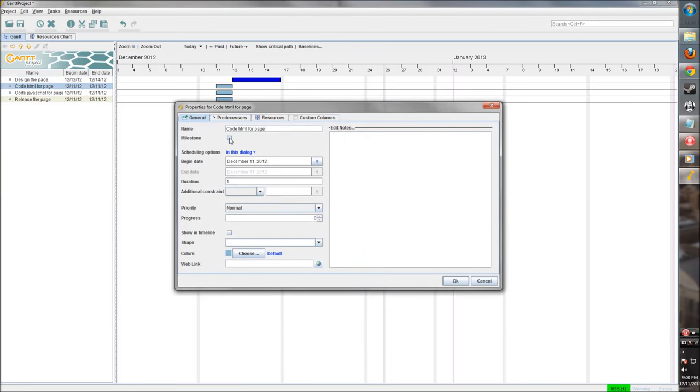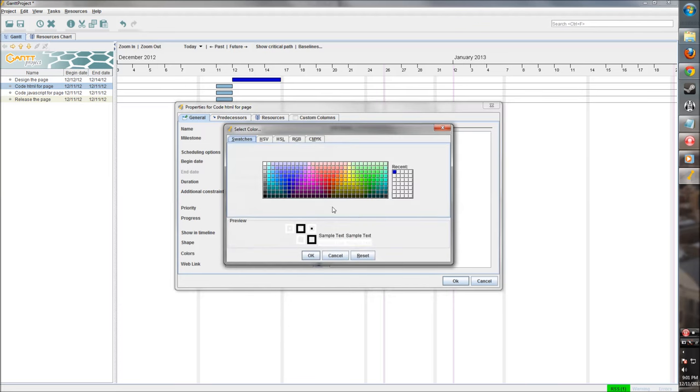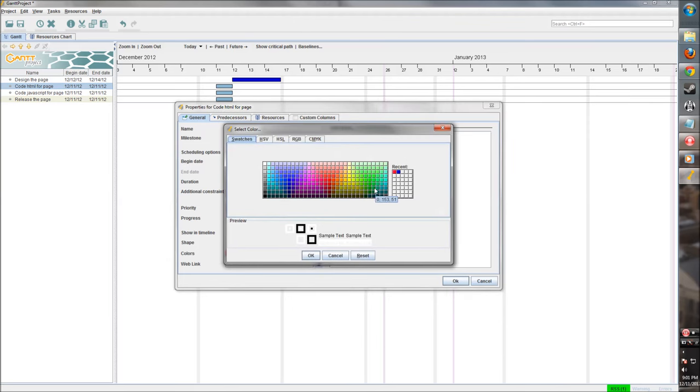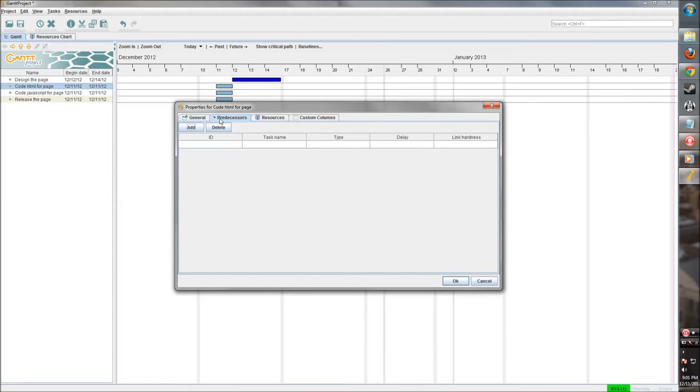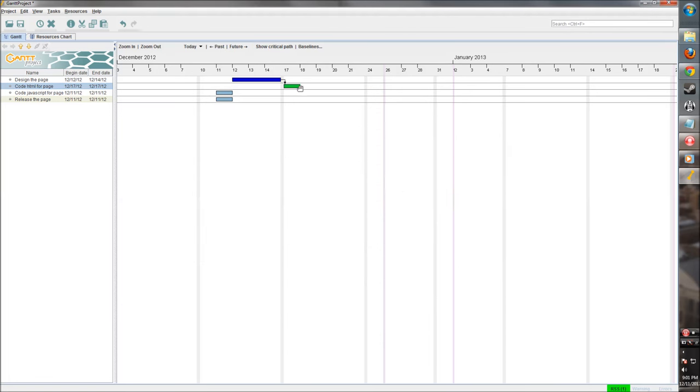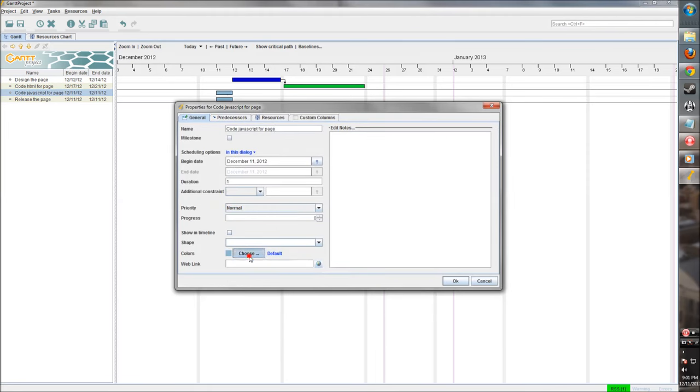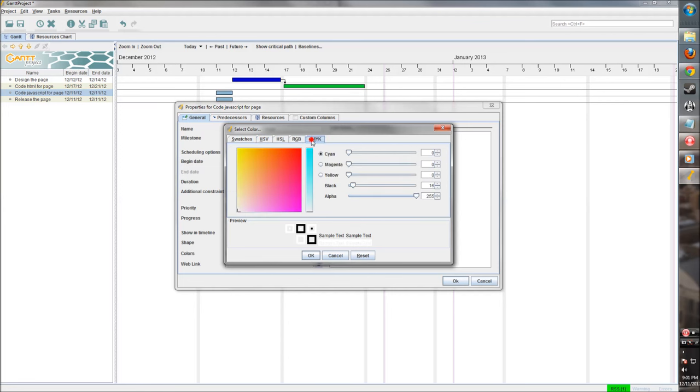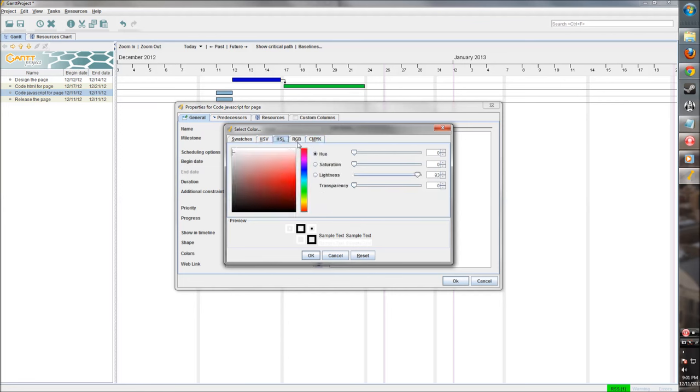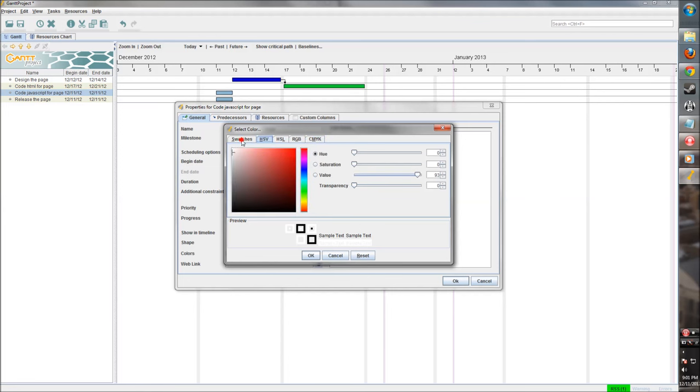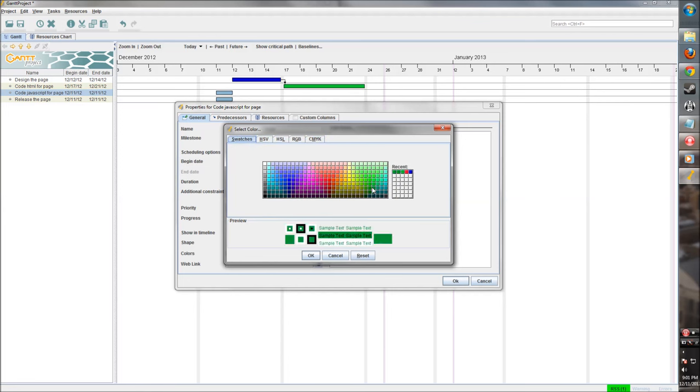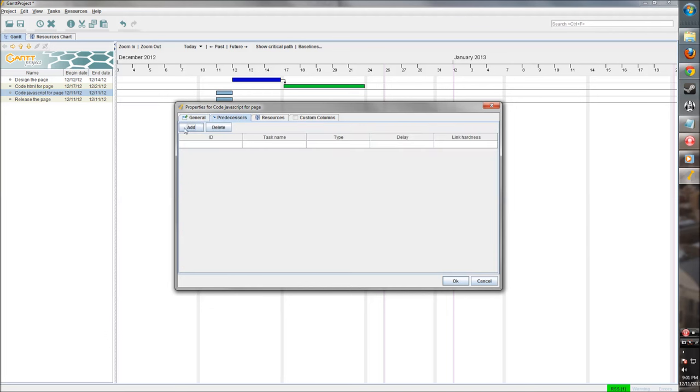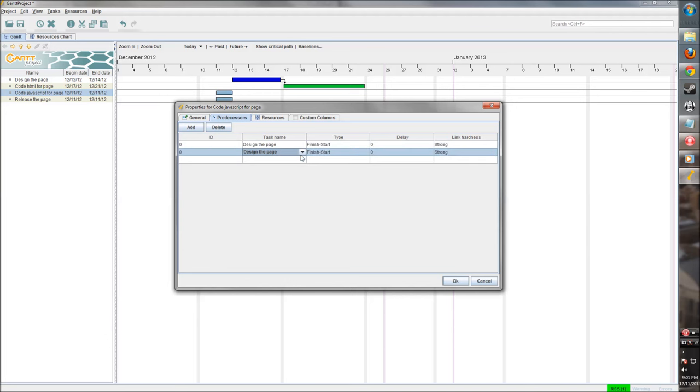Code HTML for the page. Let's have development stuff be red. Now we do want to add a predecessor. We can't code until we have the design. So now this task can't be started until task number ID, which is this one right here, until that one is complete. Let's say coding takes a week. We'll do the same for JavaScript. There's a lot of color options here, but we can really go into some deep options. But we'll stick with this. Set it the same color as the other development one. Keep all the same default options. And we also want to have the predecessor be the design.